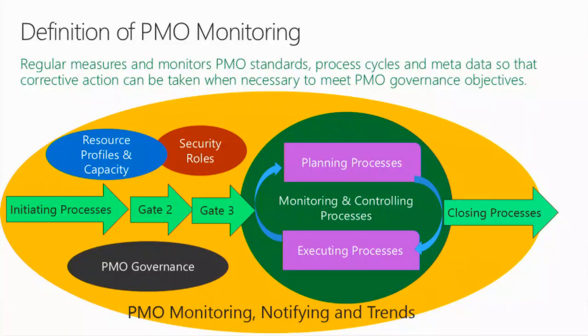You've got governance. Hopefully, you've defined some governance on what your standards are. Maybe you have a project template, and you have these phase gates in there. And a new project manager might say, I don't need those, and delete them. But you've got to watch out for that to make sure all your standards are being implemented. It's too much for one person to look at all the hundreds of rules to figure out what's missing. So you have to build processes and automate it to make it work better for you. I also put in there security. You need to make sure your security roles are set properly. You may have some administrators in there and then they leave, but you want to get rid of those roles if they leave into another department.